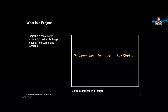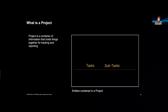A feature is a special entity for the deployment use case — it's the one that holds your hand to production. There are tasks and subtasks: task management is the core engine that makes everything work. As a project lead, you have many tasks, some non-software-related, such as ordering physical servers, office equipment moves, or setting up alignment meetings. These project tasks fit into a hierarchy: phases at the top, then deliverables, then tasks and subtasks. A deliverable is a collection of tasks, giving project leads a simplified, condensed view.